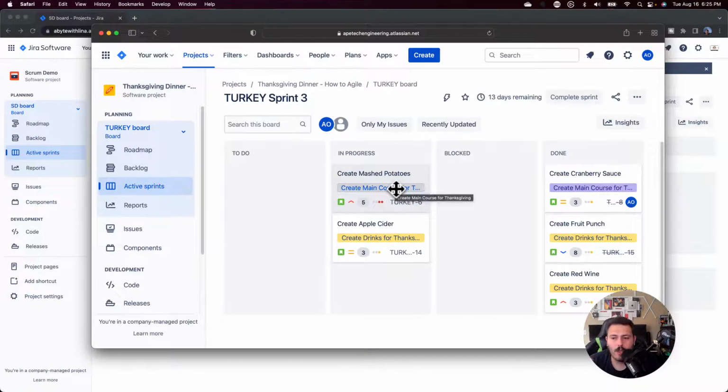This stuff can get a little tricky. So once you start the sprint, that is the scope, Gerard. Once you've actually hit that start sprint button, your scope has been locked in. So it's not easy for things to be put out of scope, because they're in scope by default, and you don't want to talk about them, right?